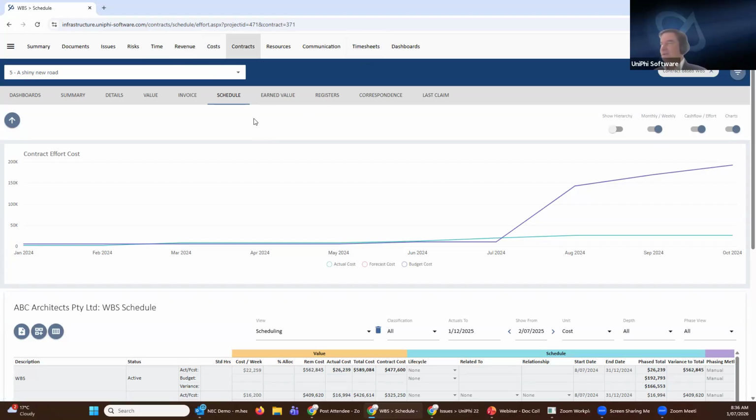Now what I'm going to do is just do the coup de grace that I mentioned, which is how does quality fit into this? And the quality element comes from the issues management. So if you're looking at, say, an early warning type relationship in a contract, and a problem arises that you weren't aware of, it gets raised. You have to analyze the impact of that. The impact could be a time delay. It could be a cost increase. That process needs to be managed, and it needs to be managed around that quality specification.